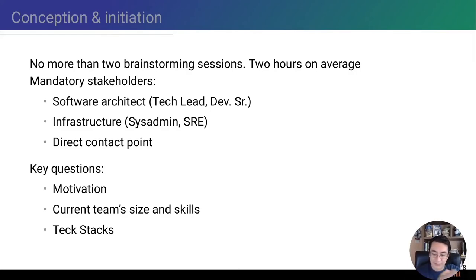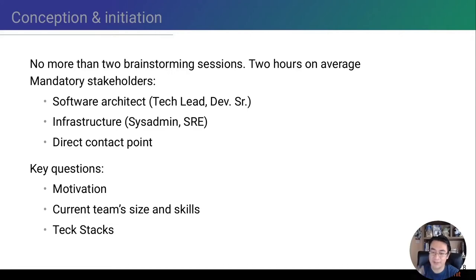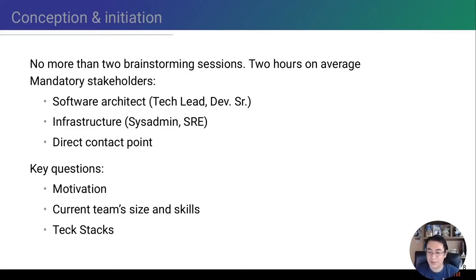The stakeholders I secured were: first, despite all the DevOps hype in which software development and infrastructure are one unit, that's not true for most institutions. So in my brainstorming sessions, I had a software architect — being a tech lead in some teams, or a senior developer in others — who has the power of decision to enforce standards and practices in the software development team. You also have to include the infrastructure director, being a sysadmin or site reliability engineer, to match expectations between the software development team and infrastructure maintenance team. And you have to secure a direct contact point, always reachable, because you are creating infrastructure and culture.